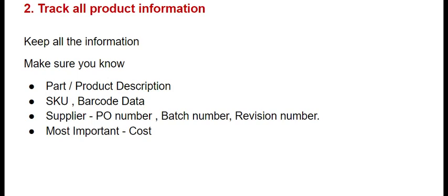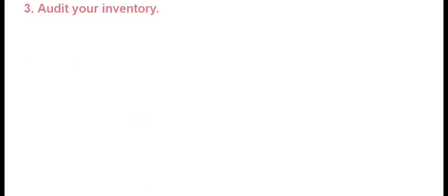Most important part, which supplier and which part has what cost. Sometimes if you need some part urgently, it's easy to just call them and get the parts. But if the same part has a longer lead time and you want it urgently, you will have to pay extra. So that is why it's important to know the cost.